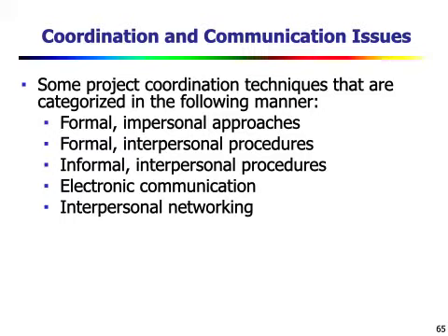Questions on information objectives: what customer-visible data objects are produced as output from the software, and what data objects are required for input? Questions related to function and performance: what function does the software perform to transform input data into output, and are any special performance characteristics to be addressed? Such questions are answered to establish the scope of the software to be built.